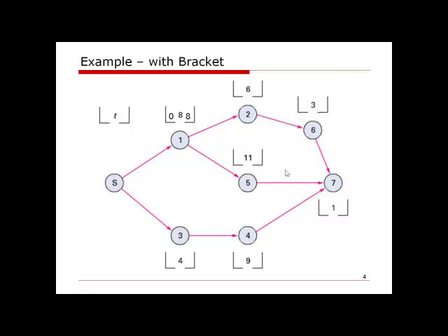Now, for activity 2 and 5, both of them follow activity 1, which means we need to finish activity 1 before we can start working on activity 2 and 5. So for both of them, they need to wait till activity 1 is finished. Since activity 1 will be finished in week 8 at the earliest, the early start time for both will be week 8 because they need to wait till activity 1 is done.